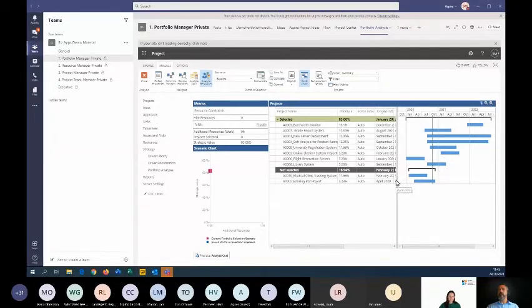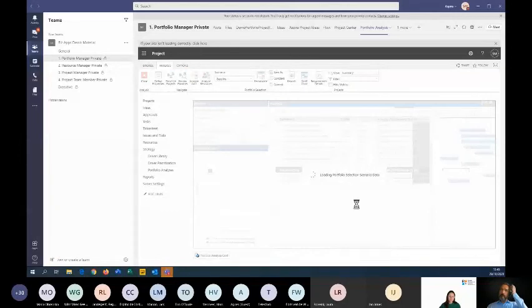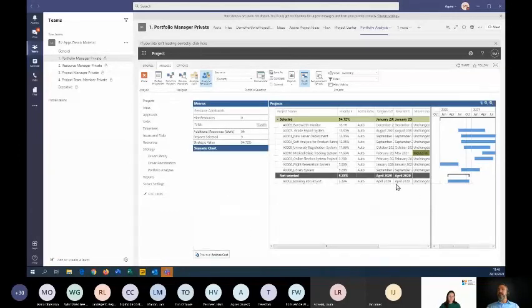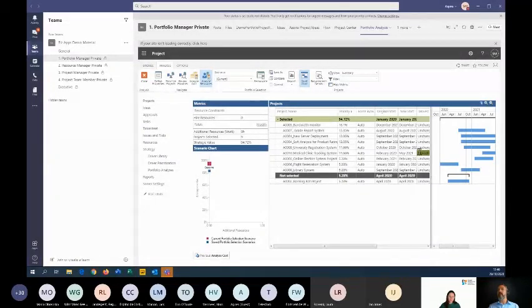You can modify the start date of the project. So we could try it here and recalculate. And you can see by changing the start date into the future, by pushing it out from February 2020 to May 2021, which may be a feasible option, it actually moved the project into the portfolio, saying that you have enough of the available resources required at that point in time to actually proceed with your project.